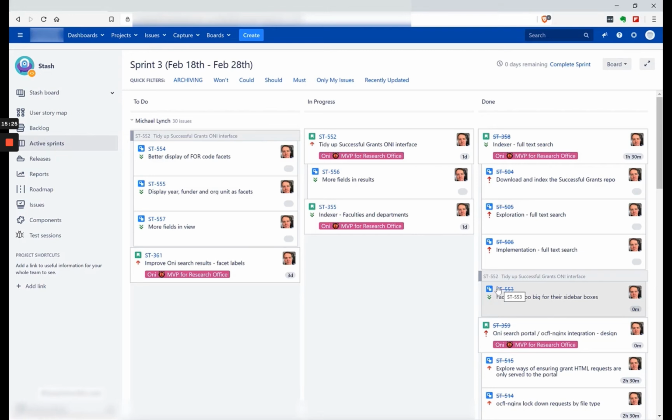And in addition to that, it might look a bit redundant. So even though Agile and Scrum theory tell us that when we're writing a user story, we should be using that structure, what you're going to see in practice is that a lot of people don't actually use that structure. They use their user stories more to represent the different things that they're working on, the tasks or the requirements, right?